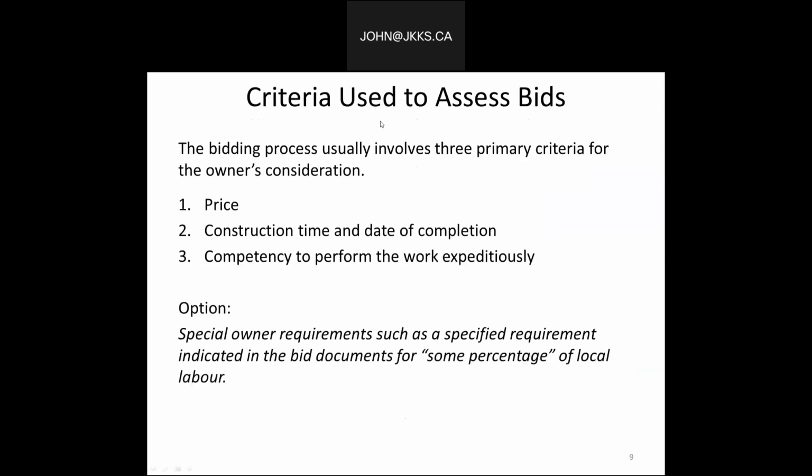Again, there's other criteria that can be used to assess bids. As I've indicated previously, the process usually involves three primary criteria for the owner's consideration. First, price; certainly construction time and date of completion; and competency to perform the work expeditiously. Certainly there is an option.